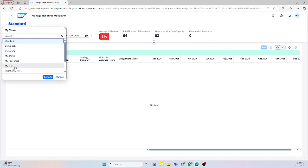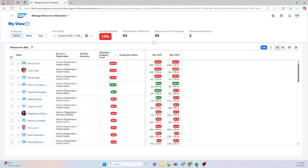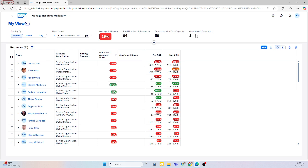And if I change my view here, it allows me to see all my resources and what their capacity is for the months. I can see my average utilization, and my total number of resources, and who's overbooked. That way, it allows me to manipulate the data to allow my users to be working with the best balance as possible.